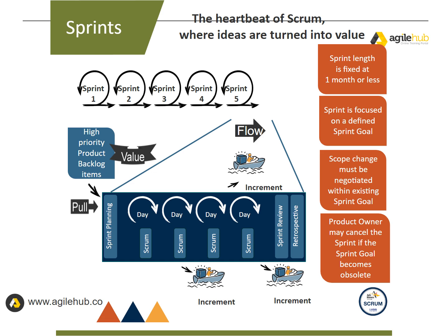All the work necessary to achieve the product goal, including sprint planning, daily scrums, sprint review, and sprint retrospective, happen within sprints. During the sprint, no changes are made that would endanger the sprint goal. Quality does not decrease. The product backlog is refined as needed. Scope may be clarified and renegotiated with the product owner as more is learned. Sprints enable predictability by ensuring inspection and adaptation of progress toward a product goal at least every calendar month.